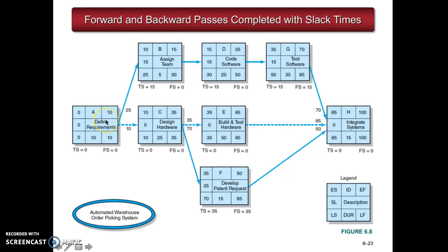So when you are asked about the critical path, the critical path would be activities A, C, E, and H. Those are the 4 activities that, as a good project manager, you want to focus on without delaying any of those tasks on the critical path. As for the others, you know how many days you can wait for each of them. And that way you will constantly manage your project without having any anxiety. You'll become very, very successful project managers.